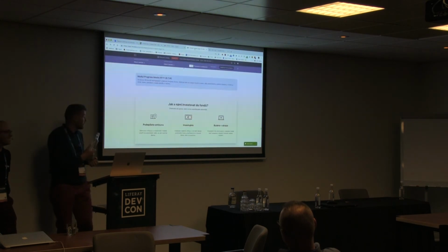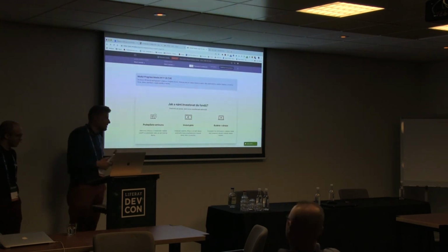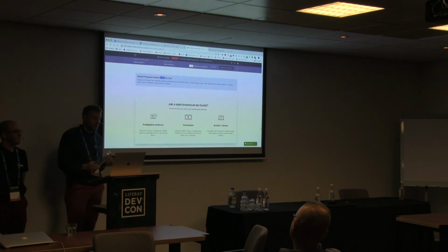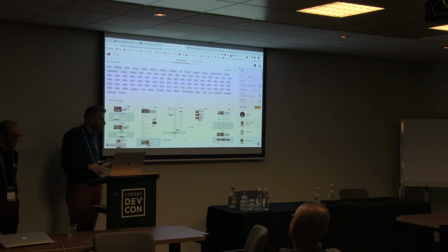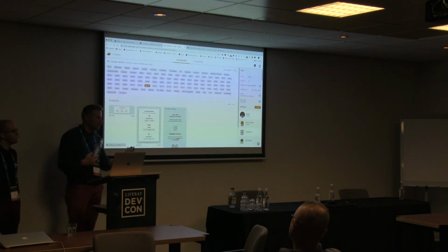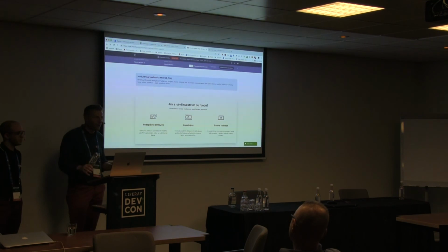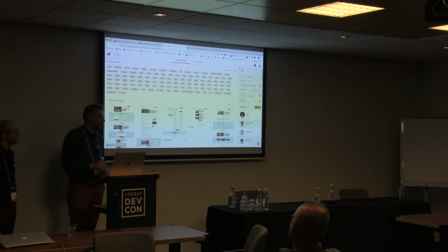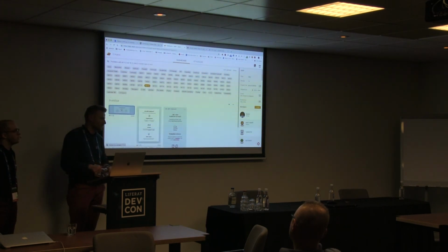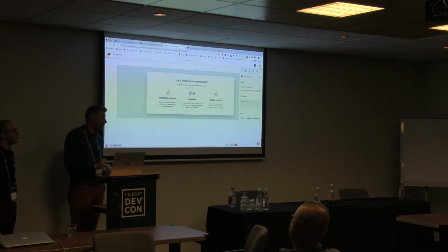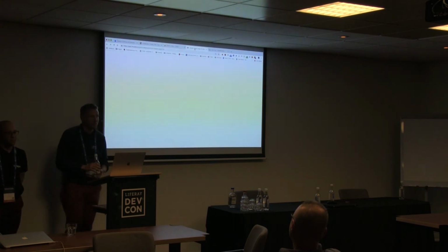For example, in this concrete case study, when we brought in the web content team and started doing it that way, the developers were much more satisfied because they were no longer doing content delivery, preparing data on the test and these things, and we really sped up. We were almost twice as fast as before, so it helps really a lot.